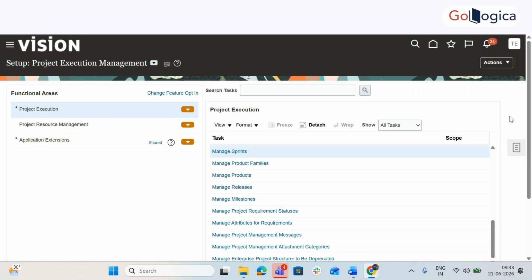So I have taken the requirement. My reports and integrations are already going on simultaneously. Along with that, I will also start the process playback phase. Means what they are trying to do, they are trying to demonstrate the system to the client, as well as requirement gathering. Not the initial requirement gathering, the major one. First 3 months we are only going to gather the requirement. Then in the second phase we are going to start developing everything. The build phase, we will start developing everything at once only. The system, the reports, and the integrations, everything. That puts up a lot of pressure on client to provide the data. So client becomes serious.